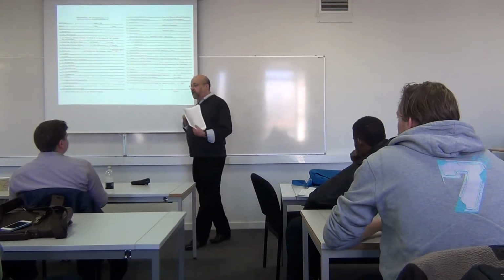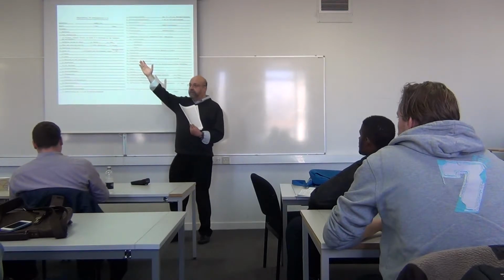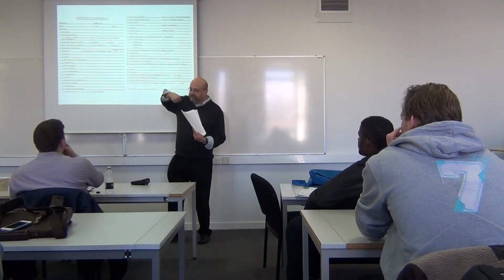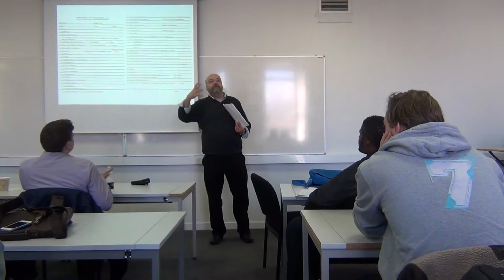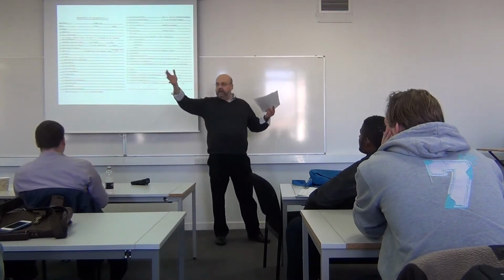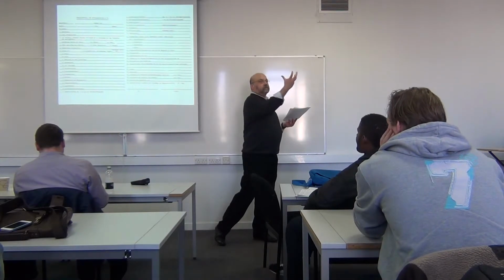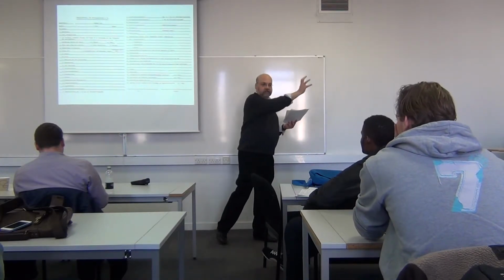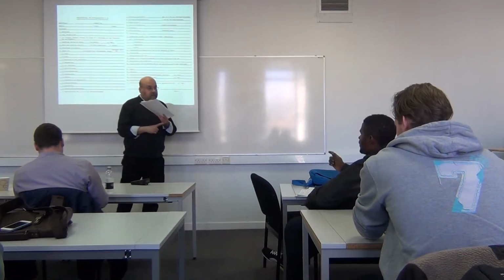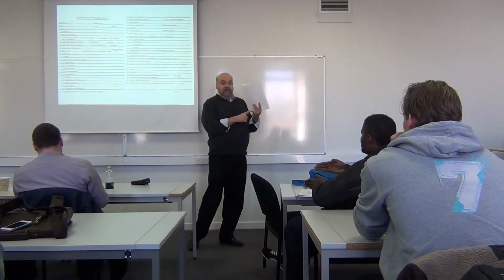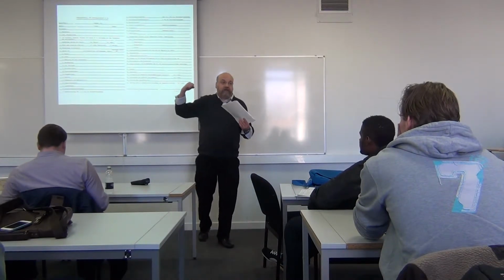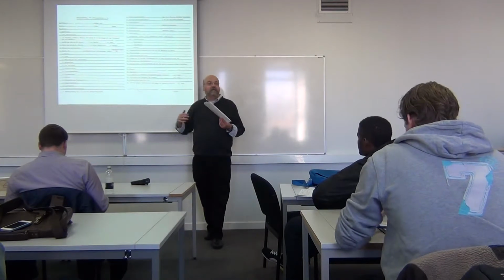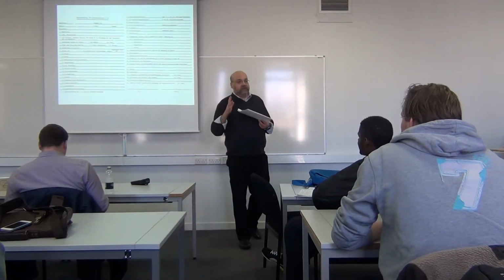It would be very interesting if his workers, for a 5 or 6 story building, have to carry it on their backs to all the floors, or if before the windows are installed, he could put it in place by crane. Much of a difference concerning time. Mechanized labor takes less time than manual labor. Workers are more motivated than if they have to carry it all day long to the different floors. So this makes a big difference.